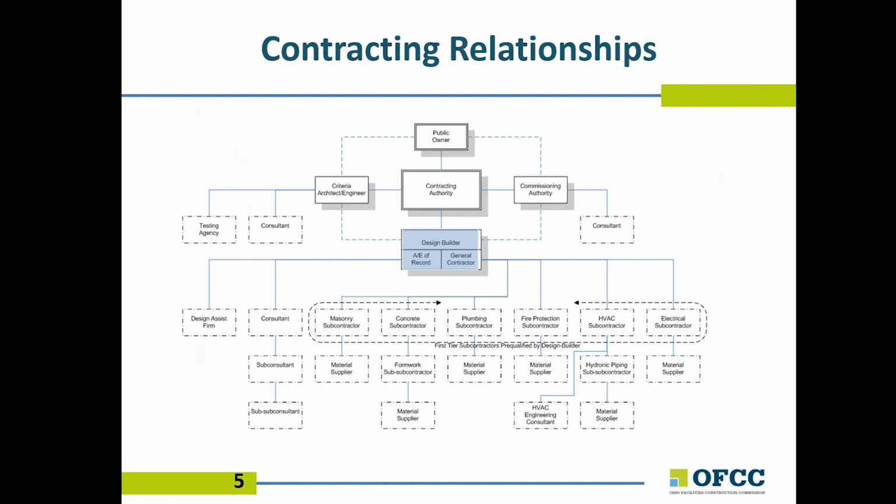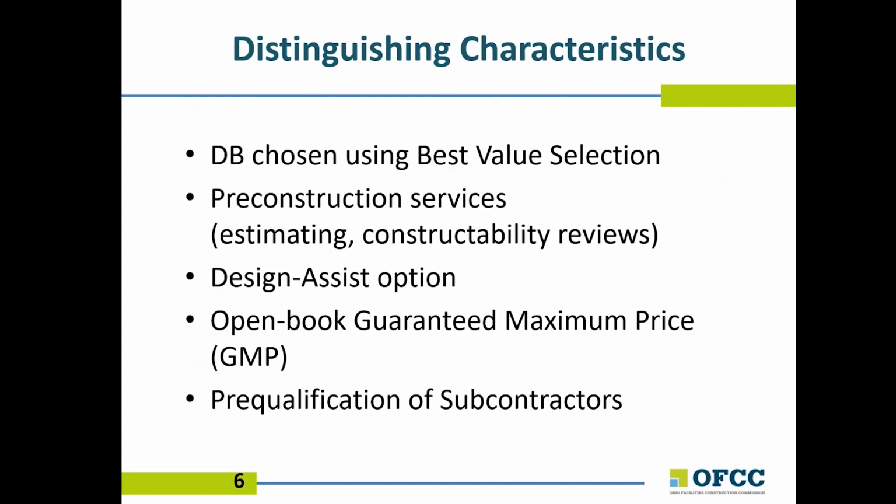Other distinguishing characteristics of design build are similar to construction manager at risk, including best value, pre-construction services, design assist option for early involvement of specialty contractors, use of open book GMPs, and pre-qualification of first-tier subcontractors.